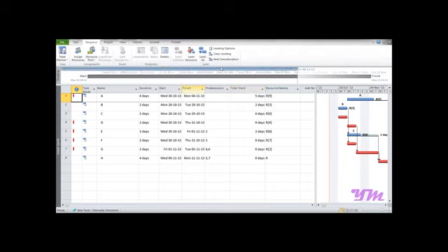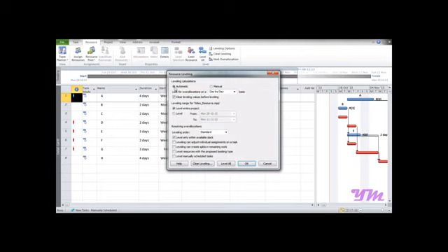the entire project cycle. To do that, you may go on to the resource tab, then go on to leveling options over here, click on it. Always select automatic mode when you are doing adjustment with available slack, and over here just tick mark the first box, that is level with only within available slack, and click on level all. Just observe what happens over here,